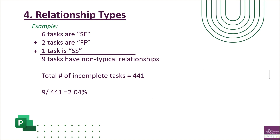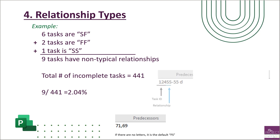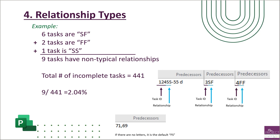Here's what to look for in project software. Predecessors with a finish-to-start relationship just show the task ID. If it's a start-to-start, you'll see the task ID followed by SS. If it's a start-to-finish, you'll see SF after the task ID. If it's a finish-to-finish, you'll see FF after the task ID.